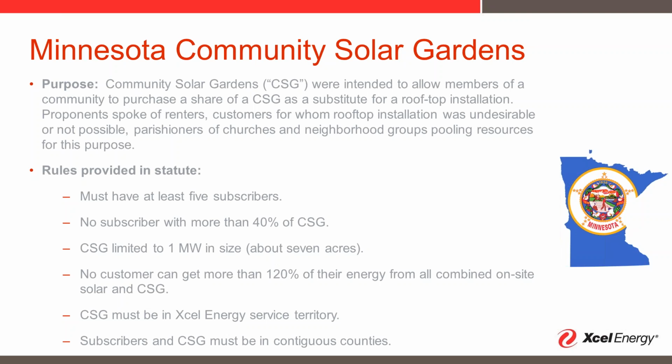And so that's been interesting to work with the developer community through that and create tools like early capacity screens to help the industry understand the situation as they're looking at negotiating land rights and permits, to get an early high-level go, no-go on some of the projects. Not necessarily saying that there will be capacity once we go through the full power flow studies and protection studies, but more giving an early heads up that, hey, there's already a lot more solar here and in queue than the load and the transformer capacity might allow. So that's been a useful tool for some developers.